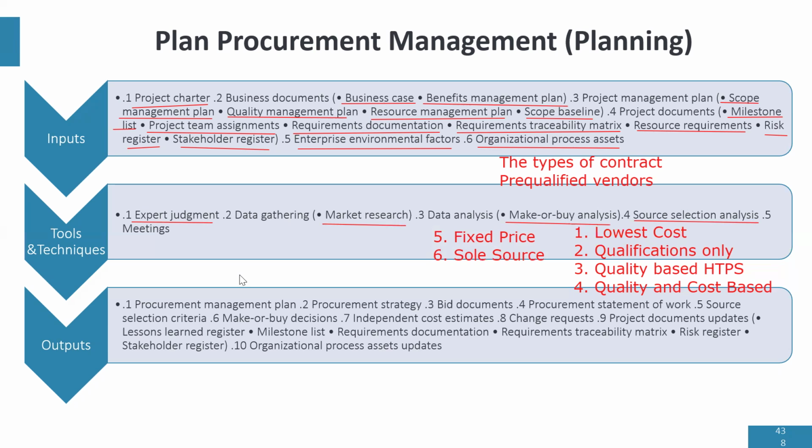So at the end of the day, we're going to create a procurement management plan, which will include the procurement activities. It will also include how those procurement activities work with the project schedule. It will include if you're going to use performance bonds and insurance contracts for large-scale projects. The procurement management plan will also include the procurement objectives, and whether you're going to use independent cost estimates or not. So it has quite a number of functions.